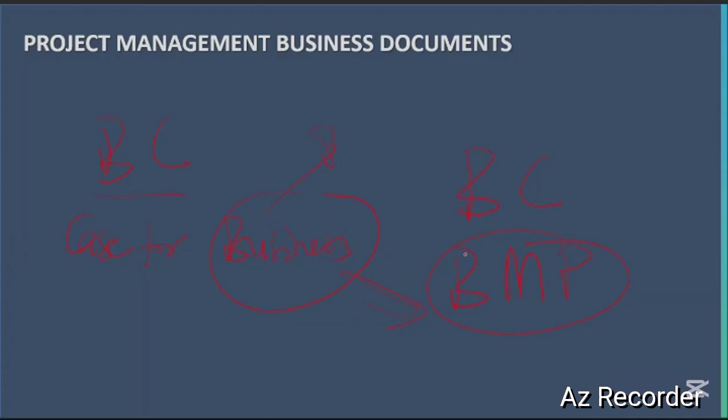And the business case will lead to the project charter. If you go through the project charter, you see a lot of the information in the business case. So write it down, it's also a question: the business case is an input to the project charter development. Okay, it's a great input. If I want to develop my project charter, understanding exactly what has to be done from start to finish, I could pick the business case to have a lot of information. So it's a great input.